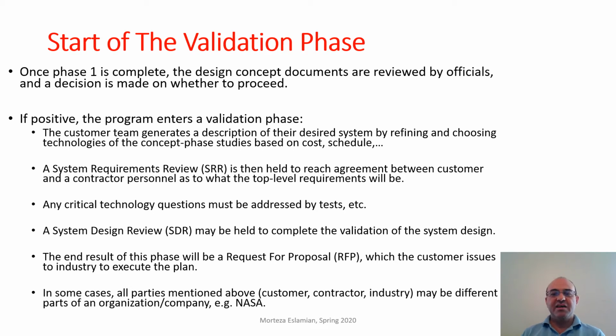It means that once this phase one is complete, the design concept documents are reviewed by officials and the decision is made on whether to proceed or not.